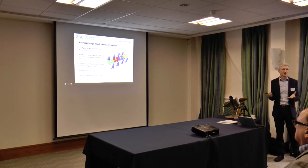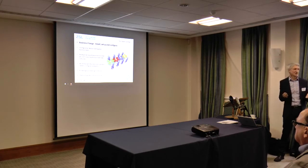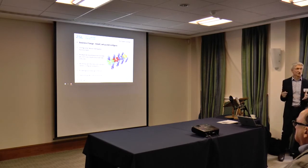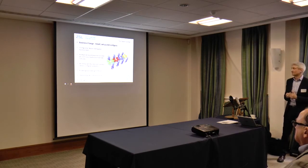So you need the vendor to do it. And I think, don't underestimate, don't skimp if you're doing a budget on what you might need here. If you can, build in more than you think you need, because ultimately a day of a vendor telling you how to do stuff is probably going to lead to 2 or 3 days of in-house stuff that you want to do to play around. You may then want to go back and ask more questions. If you only built in a day, you haven't necessarily got that place to go.